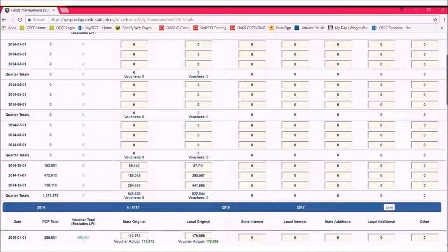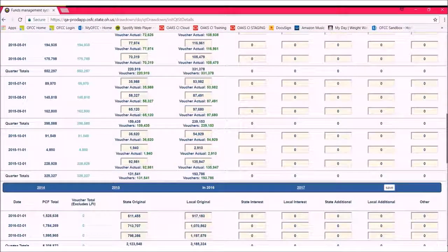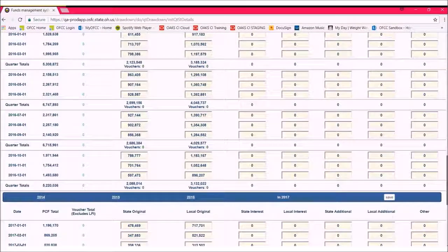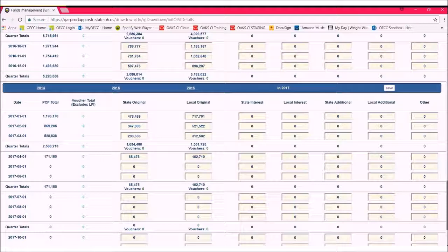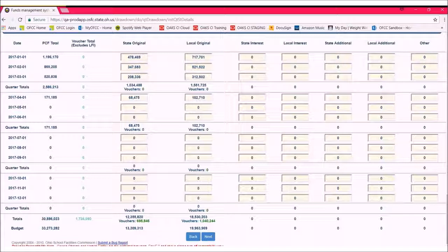Updating the actual voucher amounts, either automatically or manually, requires an adjustment to the future spending projections. You are documenting whether project spending and therefore project schedules are on time. You have either gone ahead of schedule and therefore spent more money than projected, or fallen behind and spent less. If you don't adjust future projections, the actual spending plus projected spending will no longer equal the project co-funded budget, and the drawdown will fail to be approved.